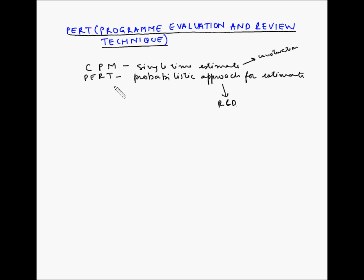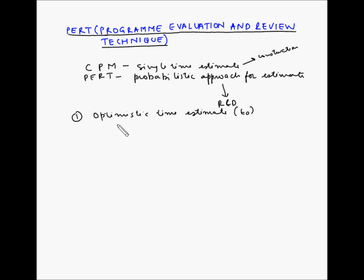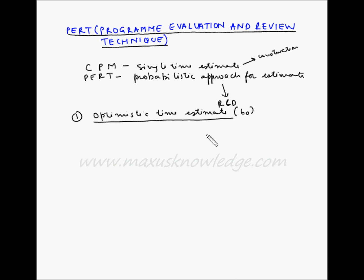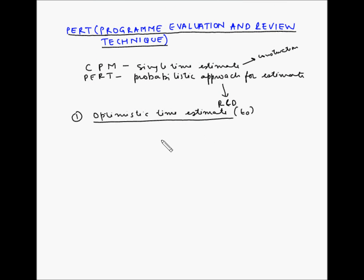The PERT system is based on three time estimates. The first one is the optimistic time estimate, also denoted as TO. This is the shortest possible time estimate of an activity. It is based on the premise that everything will go right for the earliest completion of the activity — in other words, it considers the best case scenario.